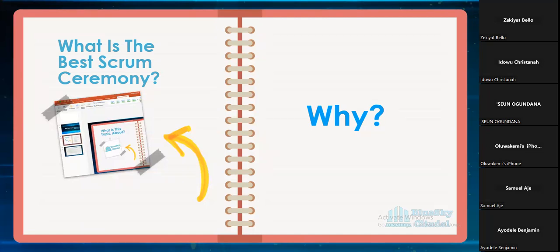Let me bring it home with a house. Somebody tells you they want a 4-bedroom house, and then you finish everything before you call the person to come and see. The person sees it and says, I don't like this, this place should have curved a bit, and the person did not mention it from the start. Now you have to start breaking that building and making adjustments, more costs here and here, after you have finished the house totally. If you are busting a place, you end up busting the pipe, you end up busting different things, it becomes more cumbersome. Now imagine this the other way, that we're using Agile to build our house.